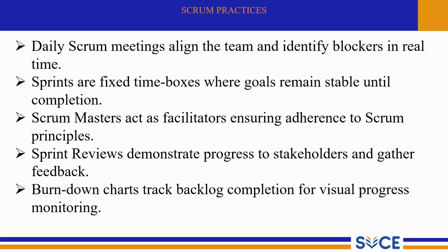Burn down charts track backlog completion for visual progress monitoring. A burn down chart shows how much work remains versus time. By looking at it daily, teams can quickly see if they are ahead or behind the schedule, making it a simple but powerful progress tracking tool.